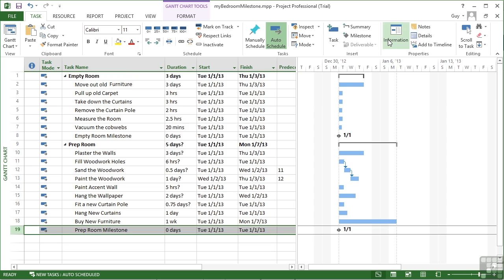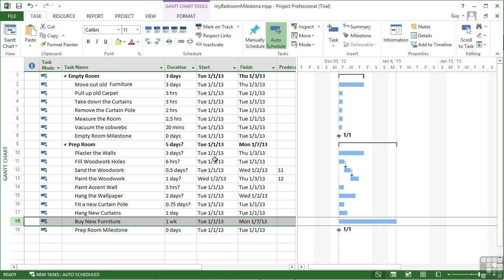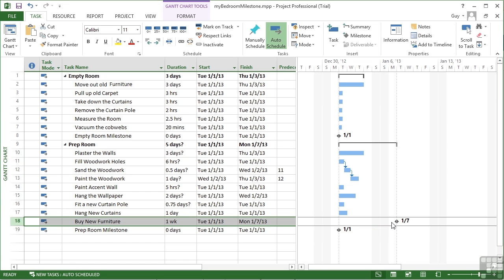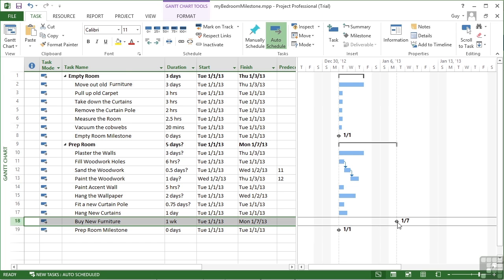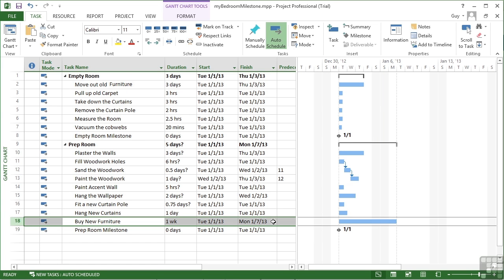If we take our milestone and go into the task information box, on the Advanced tab is the option that says 'Mark task as milestone.' You could do that for any task — for example, 'buy new furniture': go to Information, Advanced, mark it as a milestone. You'll see it gets marked as a milestone but retains its duration. We don't see that duration on the Gantt chart — it becomes a bit of an anomaly in that it has a duration but is also a milestone. The milestone marker appears at the end of the task's duration. If you want to turn the milestone off, go back into task information and remove the tick, and it goes back to showing its normal duration.